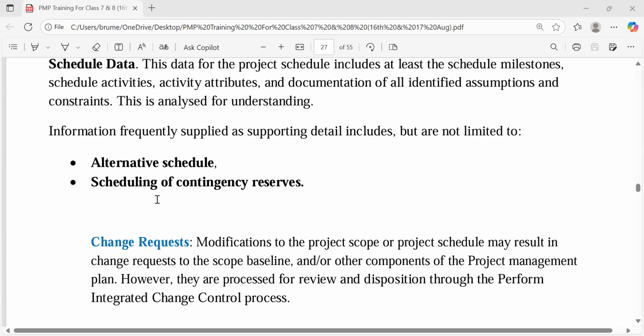That is why we say it is the known unknown. So whenever you are defining activities and their durations, ensure that you put contingencies like 10%. Because I told you that parametric estimate can give you an accuracy of 90%. So if it can give you an accuracy of 90% to 100%, you want to ensure that you're backing things up. So always add a minimum of 10%.